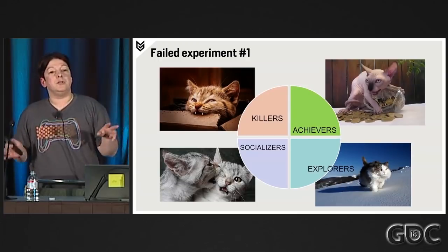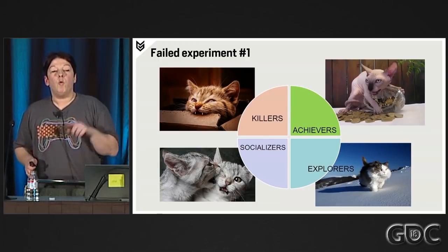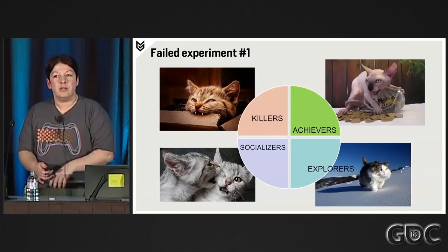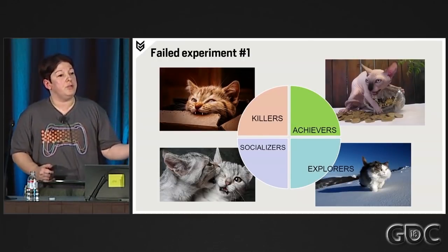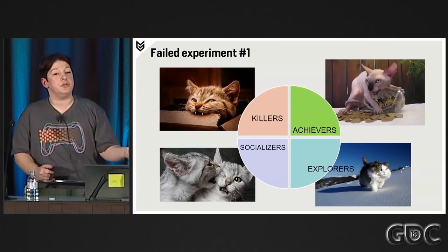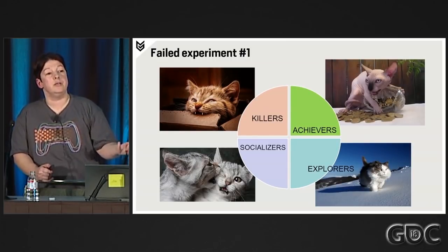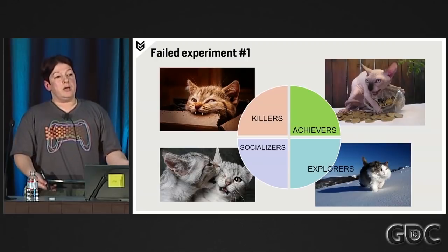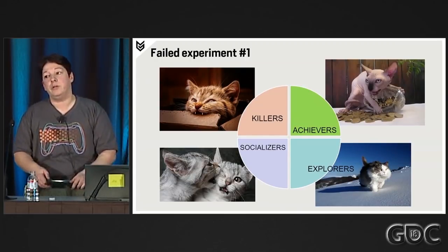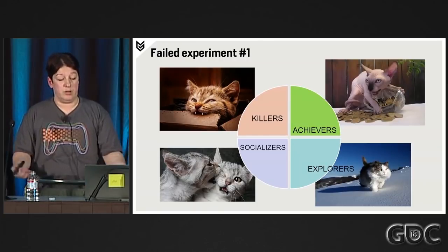I think you're starting to see the problem. We already knew where the issues were likely to be. So rather than spend 4 days or 5 days with a tester assuming this persona and playing through the game like this, we could just make a task to stress test the inventory system that would be completed in 4 hours, which was a lot more efficient.